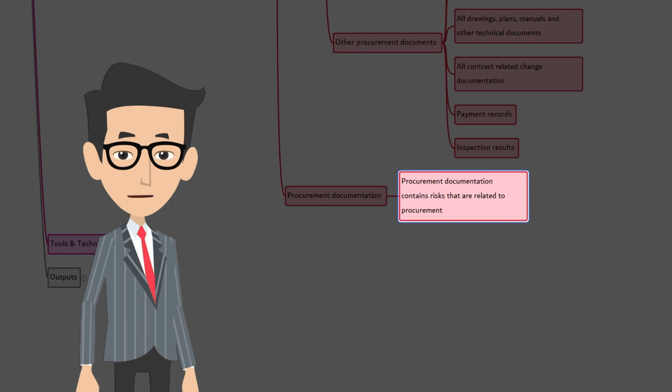Isn't it a good idea to review all the initial procurement-related documentation in the first place, even before starting the procurement? It is, right? Because procuring service from outside the organization may increase the overall project risk. Those risks may introduce additional individual risk in other project constraints. By reviewing the procurement-related documents, you get a clear-cut understanding of all the procurement-related information, risk involved, and how they will impact the project.